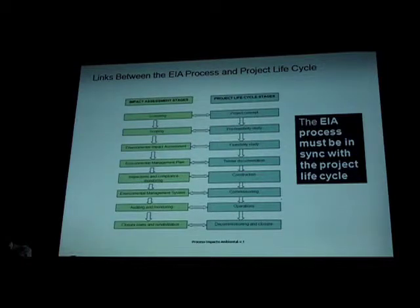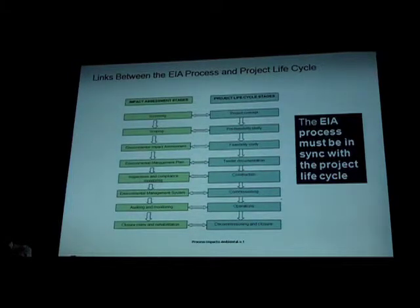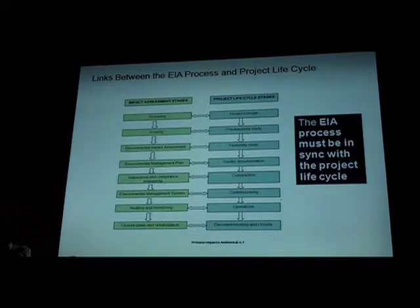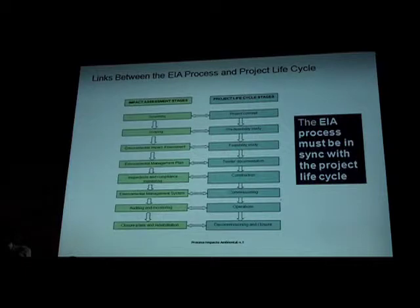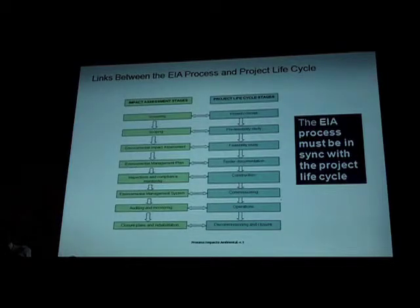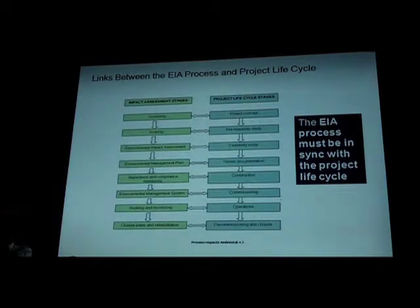The second aspect is the link between the EIA process and the project lifecycle. The EIA has to be in sync with how the project is being developed. Otherwise, you may commission an EIA at a very early project development stage where you still don't have many of the definitions for the project, which would not be as appropriate as having the EIA done in alignment with the project design. So you have to sync the development of the EIA with the project development — for example, the screening section of the EIA aligns with the project concept, scoping aligns with a brief feasibility study, and auditing and monitoring aligns with later preparations. Try to match and link your EIA process with the project lifecycle status.